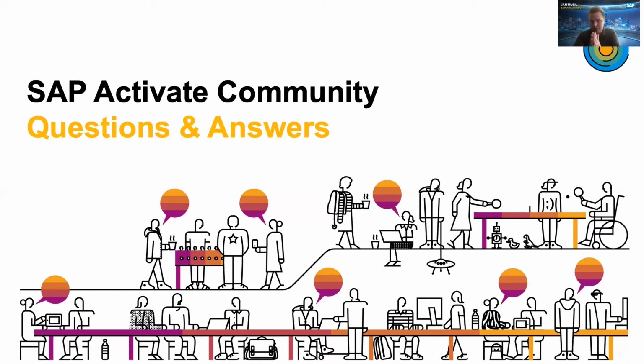Self-enablement, which is part of the change management, is a big part, especially in cloud implementations. You don't want the business users to come fresh into your fit to standard workshops. They need to have seen the solution, touched it, played with it, or at least understood how it works before they come into the fit to standard. Otherwise, your fit to standard will be a version of training with some requirements gathering, and that's not efficient.